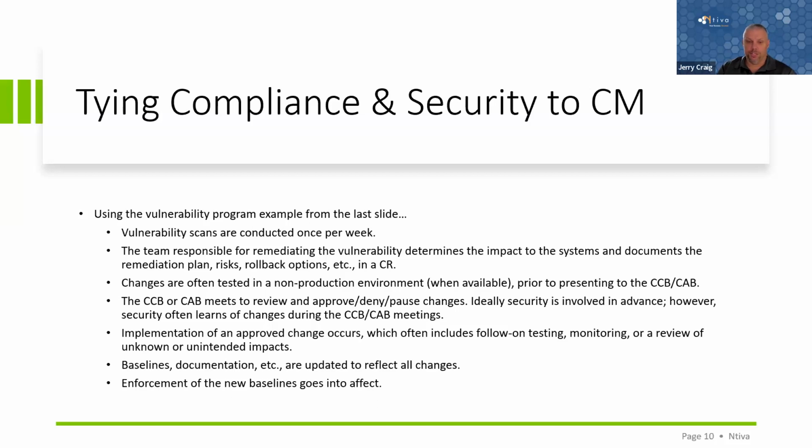In that case, it'll give you a list of all the proposed changes, and you can click approve or deny to all of them or individually, and then it will automatically update the baseline. And the next time you start, you're starting from the new approved baseline. So it can be done very quickly through software, but again, there's a cost of your time versus the product, and that's something each of you will have to look into.